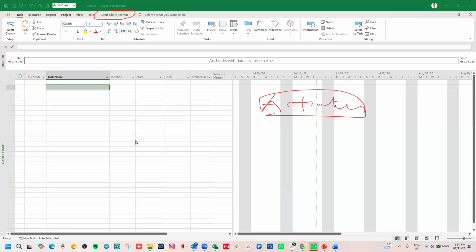We will break the activities into groups. So maybe say, let's say, substructure, superstructure, finishing, exterior, and landscaping. All right, so we will have these key milestones. We may have some subtasks under these. So please, I'll put James as a group leader. You galvanize all of them.